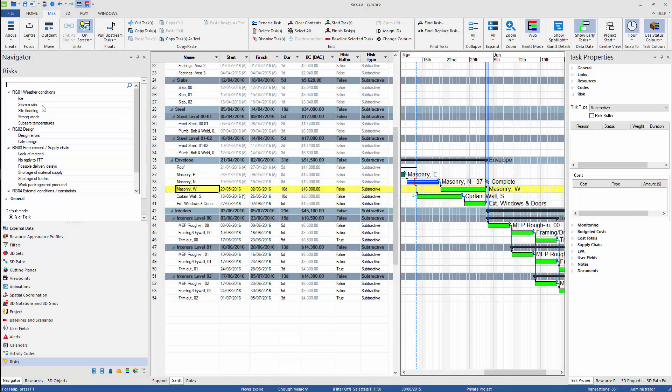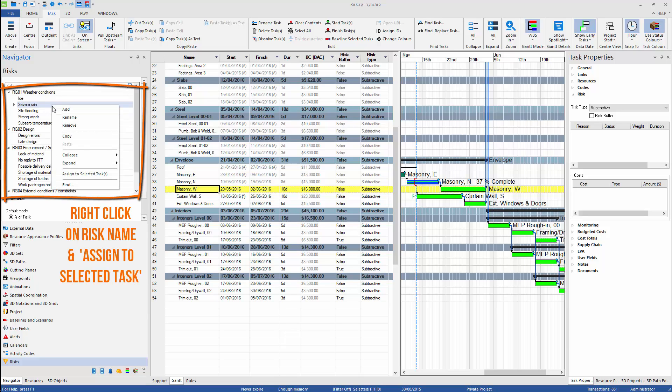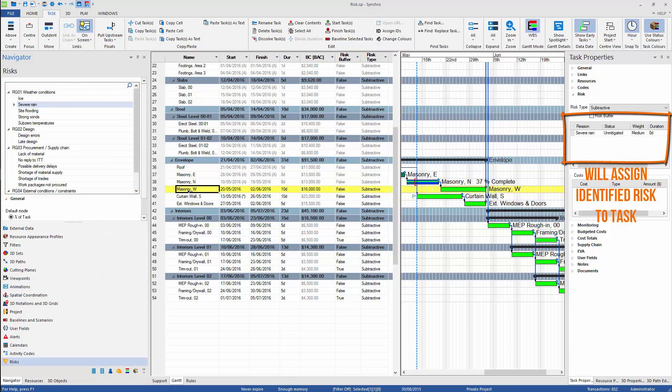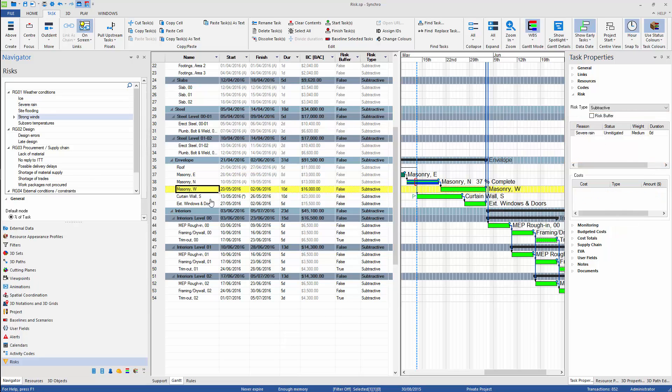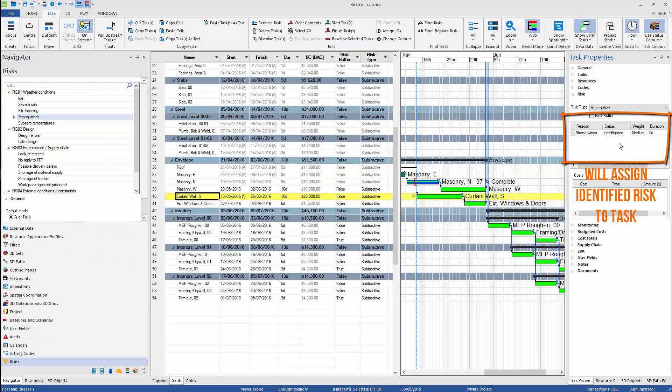Assigning risk to task is a straightforward operation. We can either do this by right-click on the risk and choose the command Assign to Selected Task, or simply use drag and drop. We can add the same risk to many tasks.